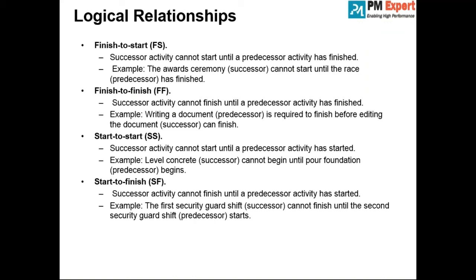Another example, you procure bricks and construct a wall. The first cycle is finish to start, but afterwards, do you keep on procuring bricks? No. You see the completion of the wall. Based on the completion of the wall, you trigger procurement. So successor drives the predecessor in case of start to finish relationship. Is it clear or not? Is the difference between finish to start and start to finish clear? If it is not, please ask me.